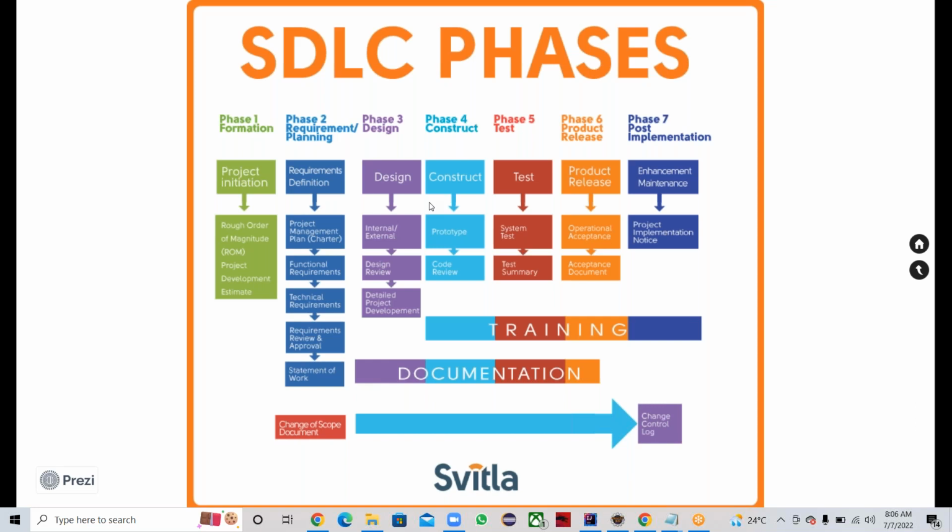In the SOW they'll mention which departments are involved: BAs, deployment, developers, testing. And if you are providing test automation as an add-on, then we provide the charges for test automation or performance testing or whatever it is. Everything will be explained, along with milestones and deliverables, at what time we are supposed to deliver, etc. Clear? And if the project gets delayed, what is the penalty that we are going to pay the company?